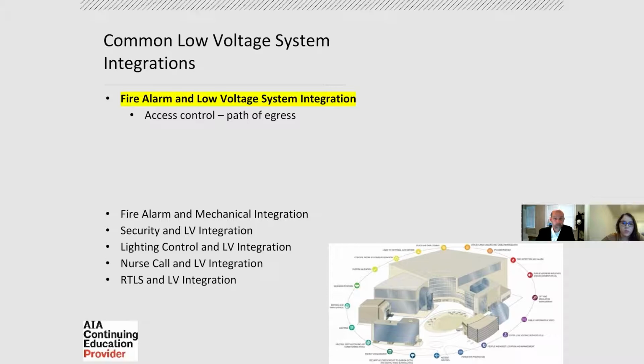So we have, oh, I can't remember who it was. We have a coworker, Tim Gallagher, recently, was it Tim? We just had somebody who recently tested a fire alarm system in a major airport, and the egress system worked, the path of egress unlocked, but it included opening doors that would let flyers just walk out of the concourse and onto the tarmac, out to the exterior of the gate, and walk around the taxiway, which of course was not the intent.